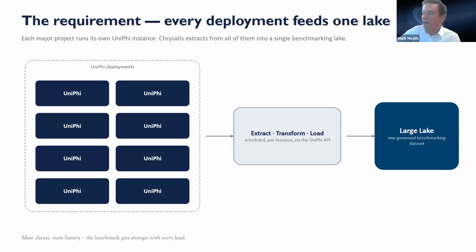And so you'll be able to get global estimating and global tendered prices and global final prices, in addition to the TPIs, which already exist in UniPhi, the tender price indexes to inflate those prices, but also the quantities around those prices as well against elements, so that you can look at quantity efficiency ratios and understand the insights that they can give you around a project and why one was more expensive than another, etc. So that's the next one, and then there'll be subsequent ones after that.